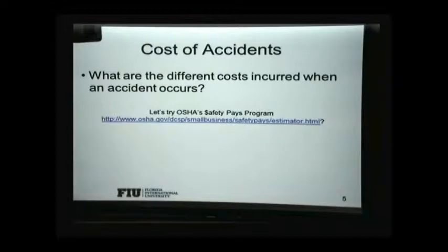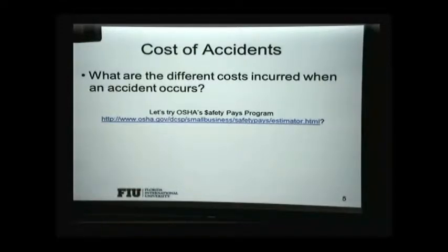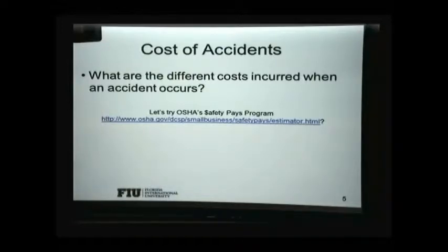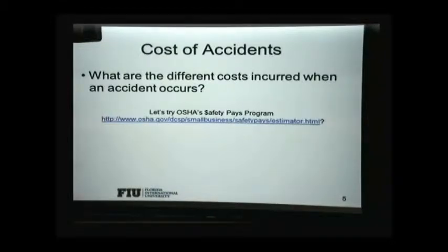From a production standpoint, you have downtime and loss of productivity — something people sometimes do not realize. If you have an accident and somebody falls, the downtime just on the surface — you have the whole iceberg theory. Ten percent is the medical cost, like driving to the clinic, how much it cost to get stuff out of his eye. But the big picture is the downtime. He may have fallen in a critical path area where you have 60 to 70 guys working. You have to clear that area for a certain amount of time. If it prompts an OSHA inspection, that's more downtime — you're pushing your schedules back. That has a compound effect.